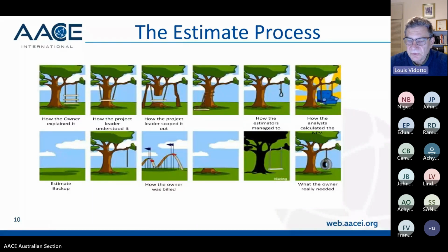And the estimators also need to be in tune with what the owners or the clients really want for their project. Some owners can't afford a really good standard of project, or the life of the mine or the asset might only be 5 or 10 years rather than 25 years. So it's really important to be in tune with that as an estimator, because then you actually do a fit for purpose estimate which reflects what the owner really wanted at the start.